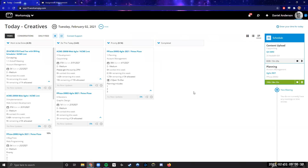Let me pivot to the Creatives Today page. This page mirrors what a resource manager would see on the assignment management page — they're meant to communicate back and forth. The workflow is that a user can either define their own tasks by moving them between columns, or see what their resource or project manager has set for them. Most of the time I find creatives are driving their own task priorities, with a project or resource manager finding particularly urgent tasks and pushing them to 'Priority' or 'Do This Today.' From a creative's perspective, at the end of the day when a task is completed, they can move it into the completed column, which updates it to 100% complete automatically.